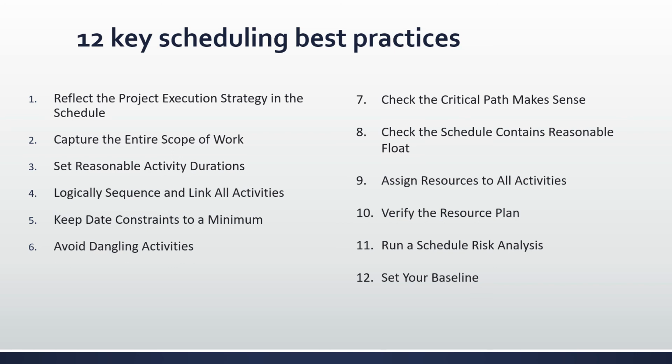With the activity durations set, the right logic in place, and a free-flowing resource-loaded schedule, you can now check whether the resource plan is executable. So you should ask yourself, do you have the right amount of resources required at the right time? And are there any density conflicts from concurrent activities and work at the location? After answering these questions, you will be able to decide and make schedule adjustments, thereby improving your chances of executing the project successfully.